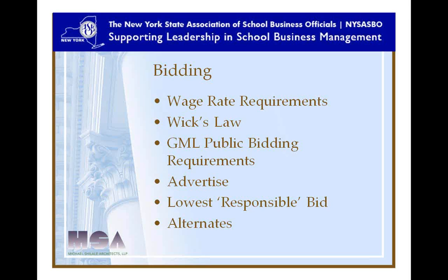They really grouped Westchester and Long Island together and gave them an exemption. I think it's the 1.5 million. Anything under that could be done without the multiple primes. New York City had a 3 million exemption, but the rest of the state, instead of a 50,000 exemption, which was there from the 20s, I believe, is now about a $500,000 exemption. So any project under 500,000, you can go to a single contractor.